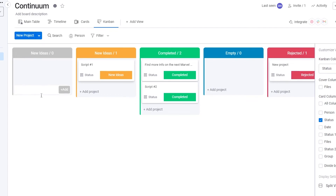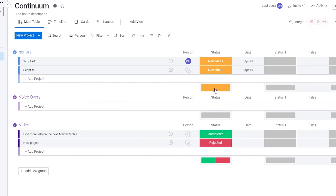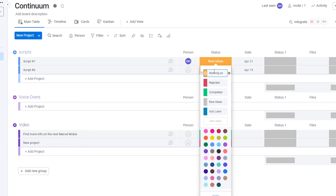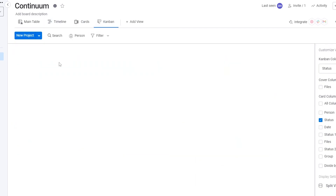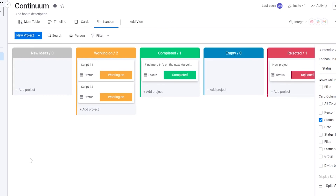In Kanban, add your projects, assign them to your team, and move them between stages. You'll have columns for new ideas, working on it, completed, and rejected. Keep the empty column if you want or remove it. This is my typical workflow — ideas come in, get worked on, get completed, or get discarded if they can't be worked on.